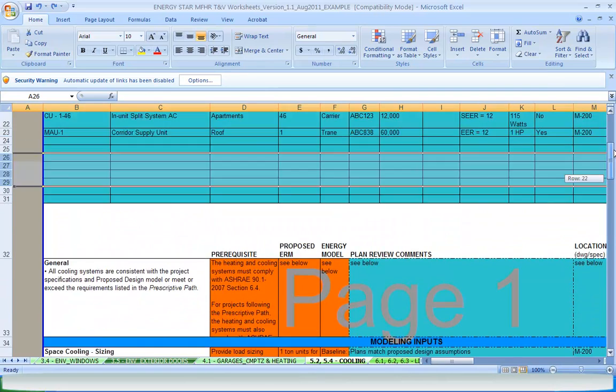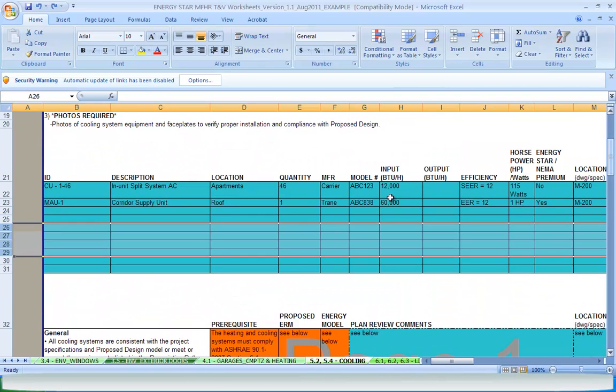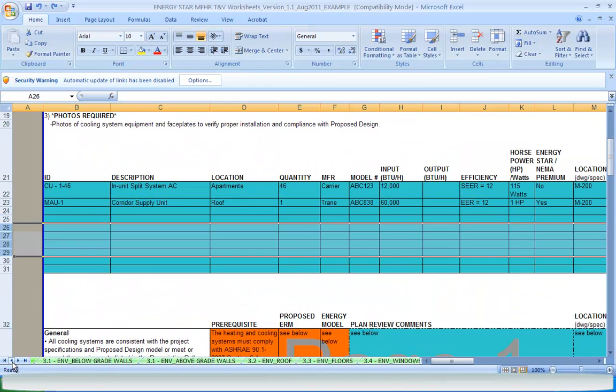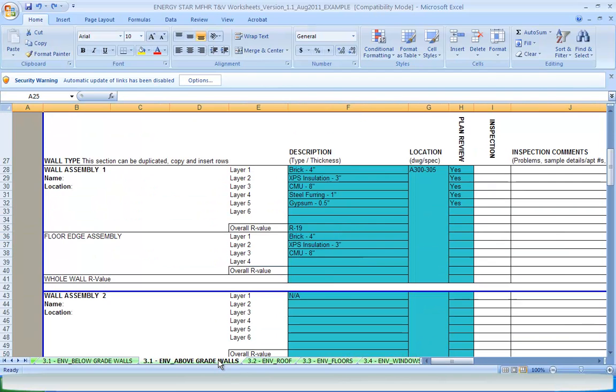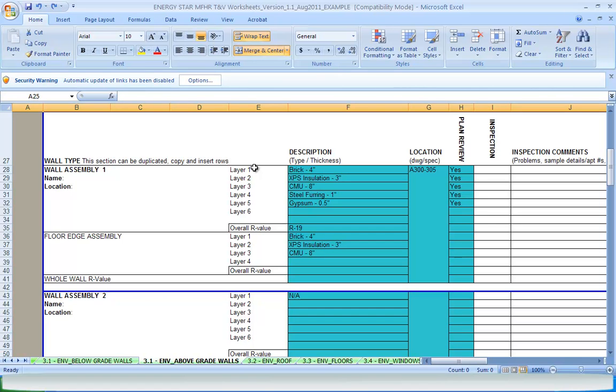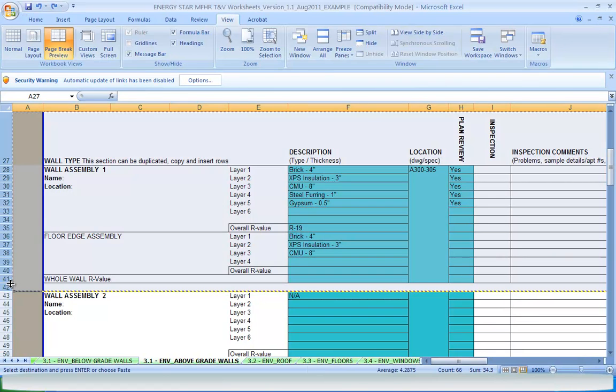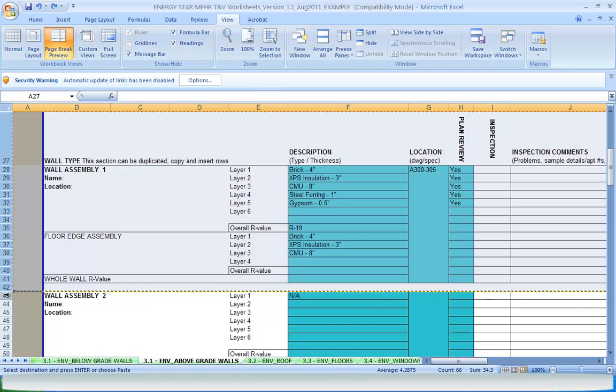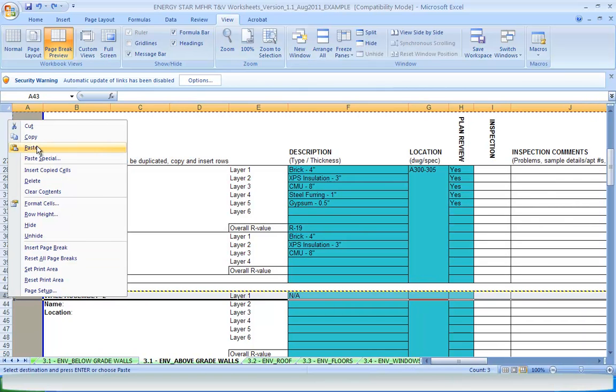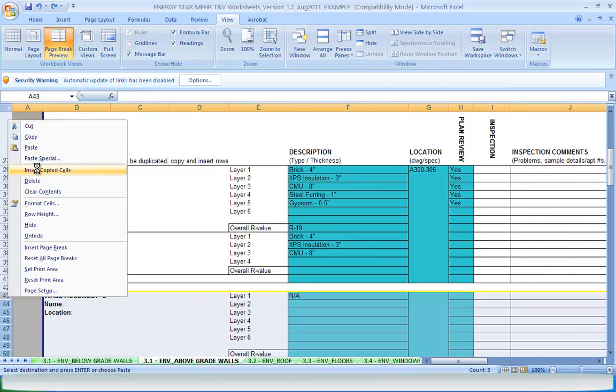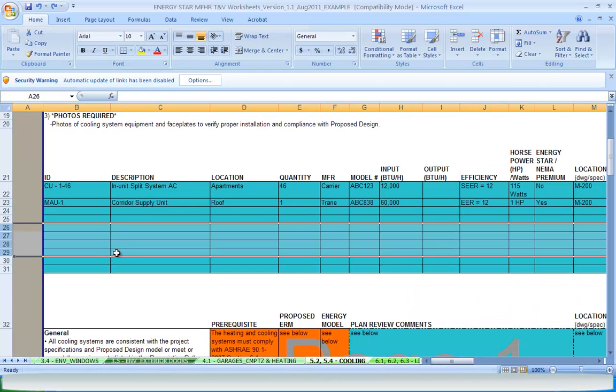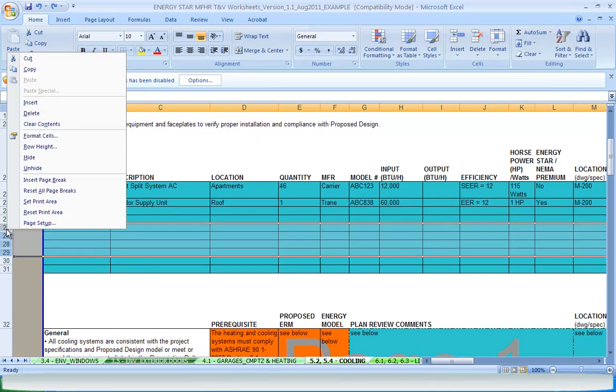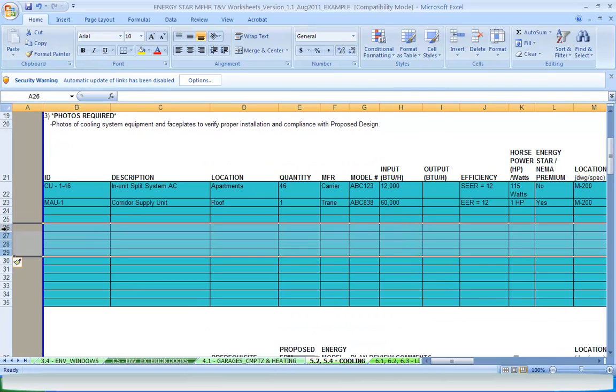Some worksheets have schedules for building envelope assemblies or HVAC equipment for easier tracking of characteristics specific to that type of equipment. Another example is the above-grade wall worksheet. Here there is a schedule set up for two different wall types with a separate assembly for floor edges. This can be used to look at the R-value of each individual layer as well as calculate the total effective R-value of the wall and floor edge assemblies. These rows have been left unlocked so they can be copied for multiple assemblies or rows can be inserted for additional equipment for the HVAC protocols.